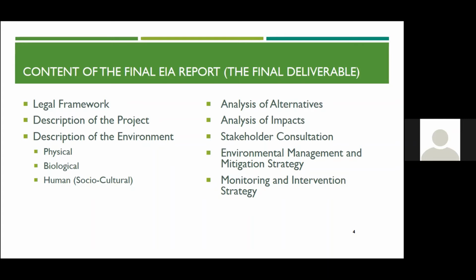Monitoring and intervention strategy. This is essentially a monitoring plan, so it will include parameters and any monitoring frequencies of these parameters. This is to ensure that each impact of the proposed project is monitored and measured to determine if the prescribed mitigation measure is achieving the objectives.